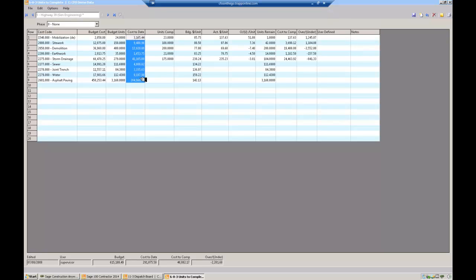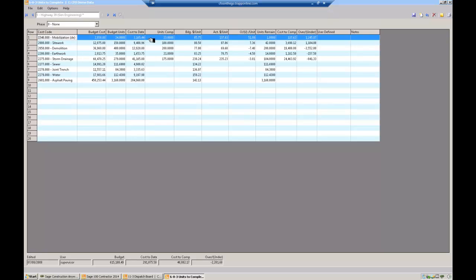Associated burden, all your material invoices, subcontract invoices, equipment rentals, what have you. These are the units that are completed. Again, a quantity that's performed, measurement that's performed in the field and uploaded. So a very simple example is, based on this information, I budgeted $86 a unit, and it cost me $138 a unit. On this one, I budgeted $80, and it cost me $87 or $88.